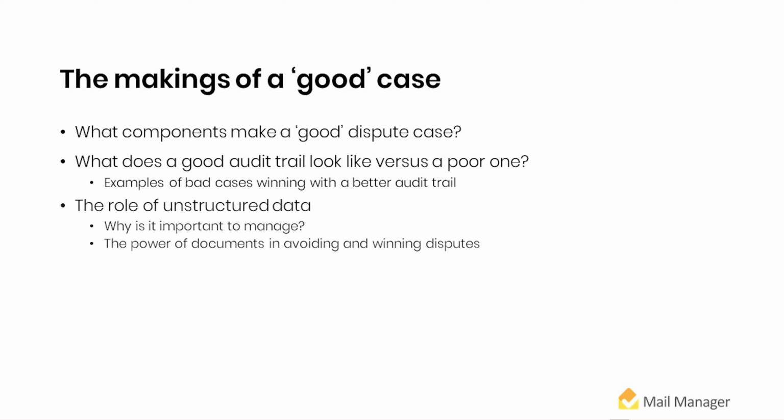So it's not unusual for me, even on a relatively modest case, and by that I mean, let's say it's around £10 million in dispute. So not an enormous case, but not tiny either. But a £10 million dispute can easily generate 1 million documents. There is no physical way anyone can sit down and read 1 million documents in any sensible way in order to work out what really happened on the project.